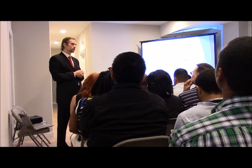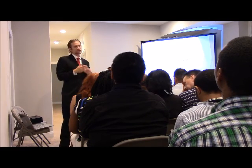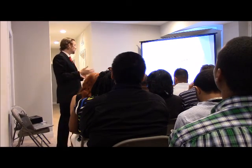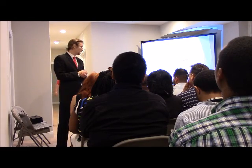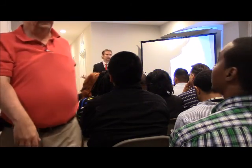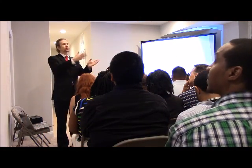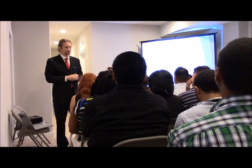So how many days do you need to give? Each trade is different because the city has different inspectors for different things. Some inspectors are better than others, but that's why we order ours so far in advance. The nice thing is by ordering them in advance, we're not at the mercy of the inspector, because we already have that date scheduled two, three, four, five months out.